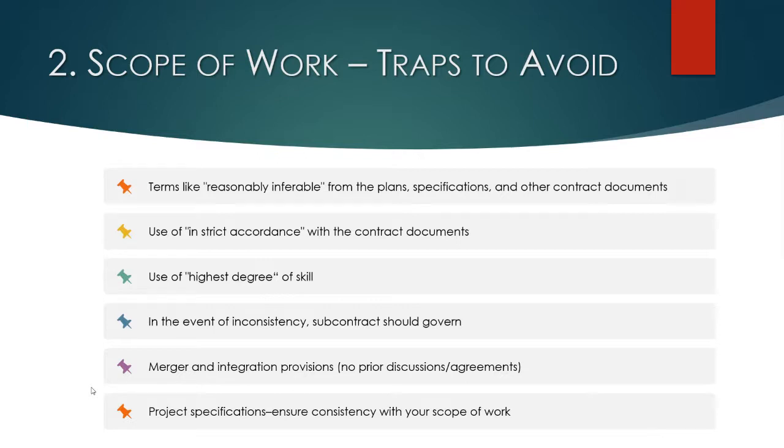These are some traps to avoid in terms of your scope of work on any particular subcontract. Avoid the fancy terms like reasonably inferable from the plans and specifications, or in strict accordance, or the highest degree of skill. Those are all things that owners and general contractors like to slip into agreements, but do your best to try to carve those things out, because that just allows for someone on the other side to argue that